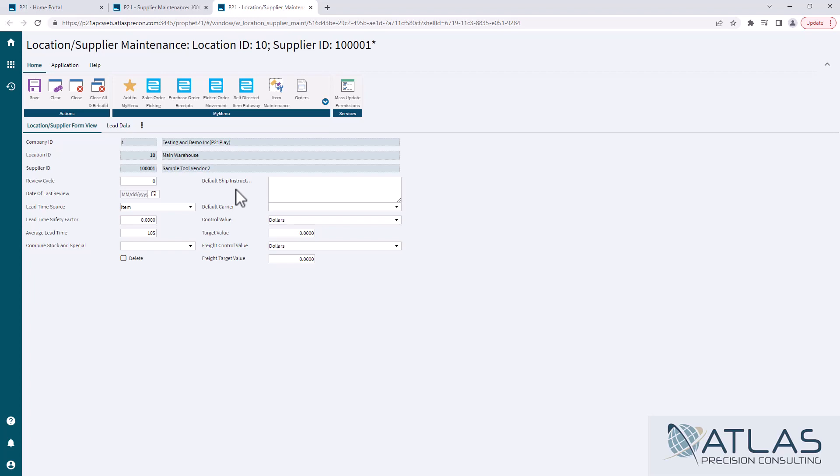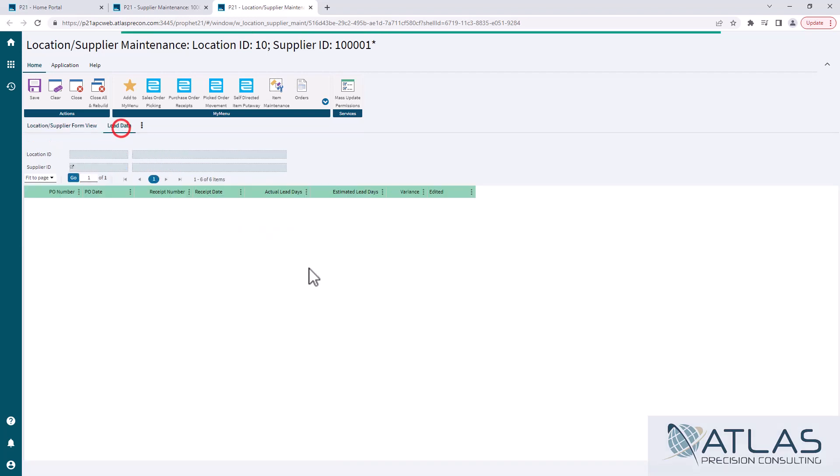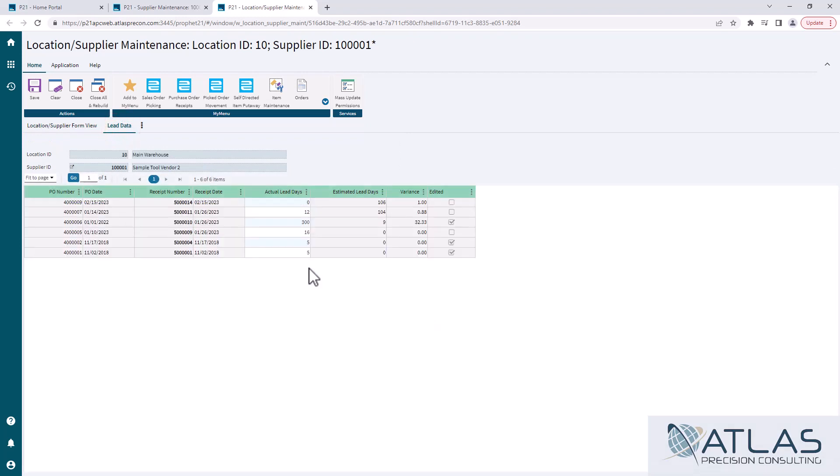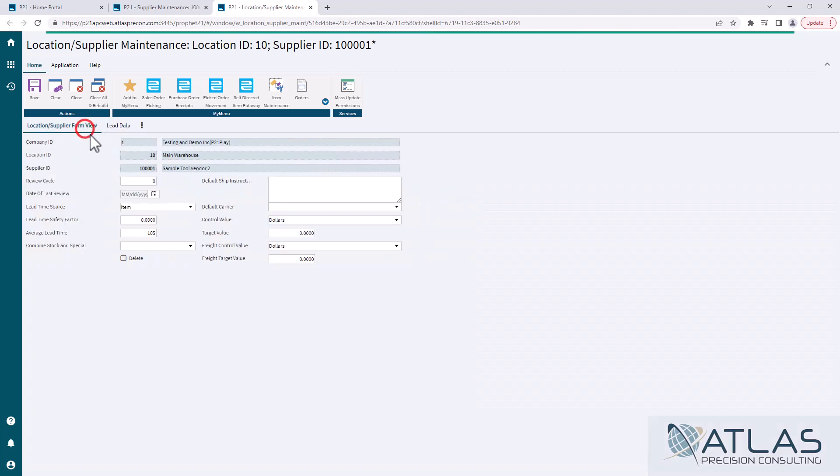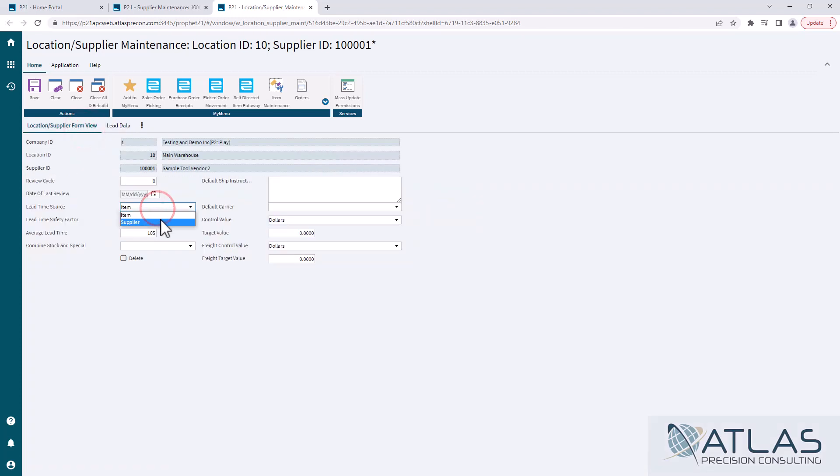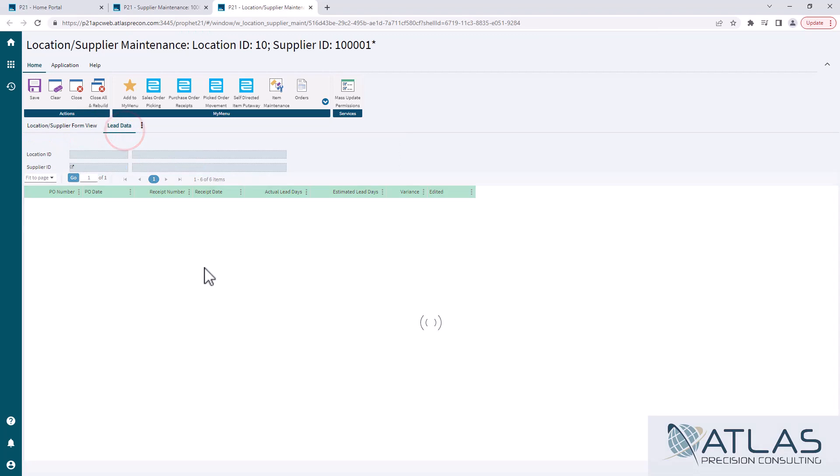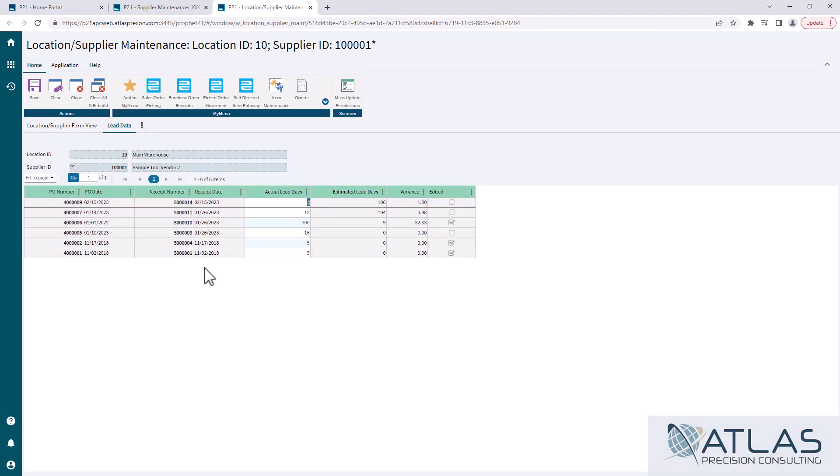The one big thing this screen does have is it has the lead data calculator. Now, this is only important if you are doing your lead time based on supplier, not item. So if you want to update the average lead time on an item, we've covered that in another video. That's an item maintenance screen because it's very specific to an item.